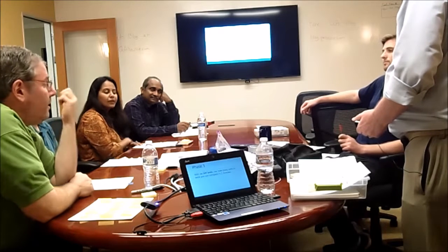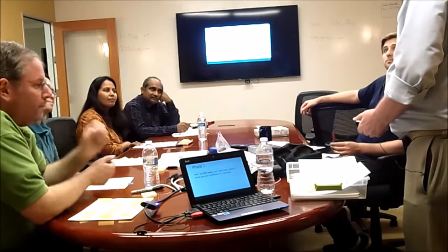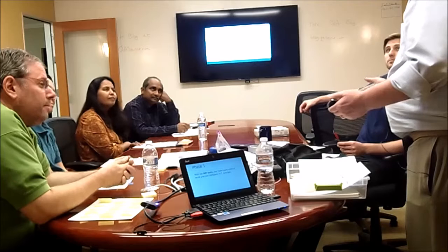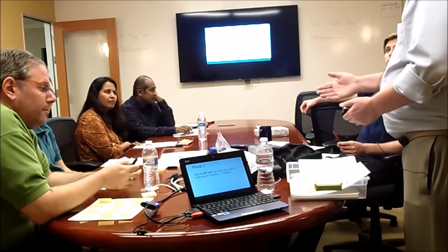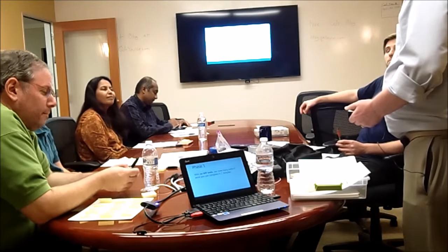Because we have to do that task before we move on and do anything else. So the work is incomplete if it's not done. I think of it as the bottleneck setting the pace for the entire line. The line cannot move faster than the bottleneck can move. And this makes you the most important person, meaning they won't let you take breaks. You have to work longer and you're still only getting this many done.